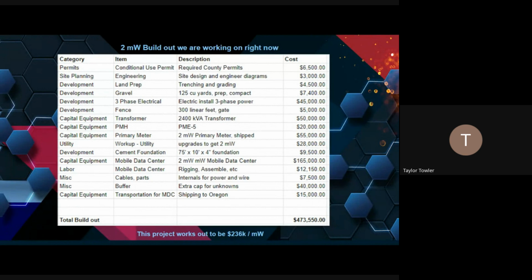And if you have the means or capability to build out your own warehouse, you can get it done a little bit cheaper, but it is harder and comes with more risk in terms of not getting the engineering that's been done for you in those containers correct. You can build out a warehouse for something like 150K a megawatt if you're able to do that engineering and design work yourself.